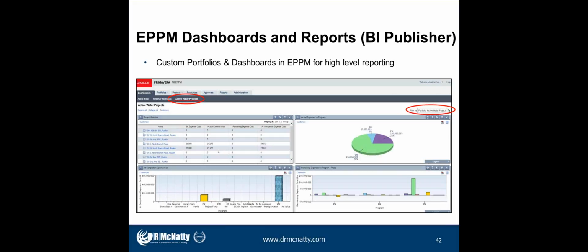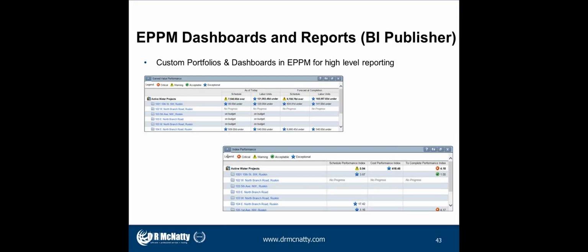We're planning on creating what we want to call director dashboards where they can log in and see specific information. They wouldn't necessarily have the ability to change a lot of it, but we would train them to log in and see information in this graphical format. Adding on to that, here we've got our earned value coming in, our index performance, specifically our SPI and our CPI for the different schedules. And again, a lot of this information used to be coming from Excel.